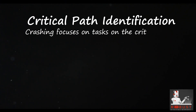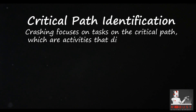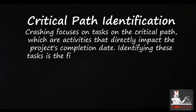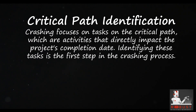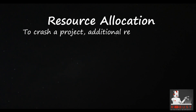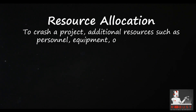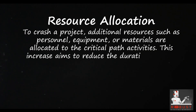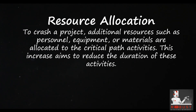Critical path identification: Crashing focuses on tasks on the critical path, which are activities that directly impact the project's completion date. Identifying these tasks is the first step in the crashing process. Resource allocation: To crash a project, additional resources such as personnel, equipment, or materials are allocated to the critical path activities, aiming to reduce the duration of these activities.